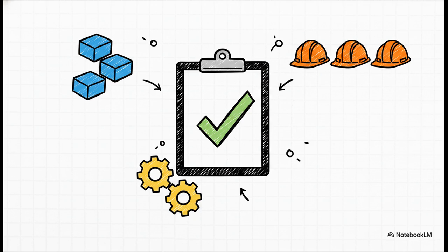In a chaotic, ever-changing project lifecycle, standardizing whatever you can reasonably control is the absolute master key to reducing variation. This means design standardization, utilizing uniform architectural elements and components wherever possible. It means process standardization, creating unified work instructions. Think about it. Even if the building design itself is totally unique, the way your teams pour the concrete should be exactly the same every time. Finally, engineering skill set standardization ensures you are building consistent capabilities across all your diverse teams. This standard baseline is exactly what creates the predictability you need for VSM to finally take root and thrive.